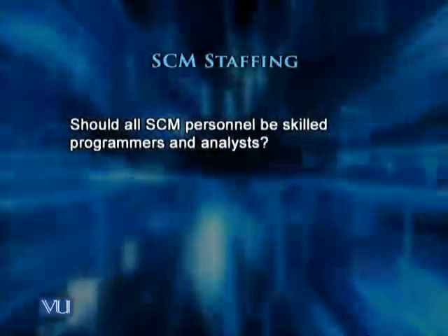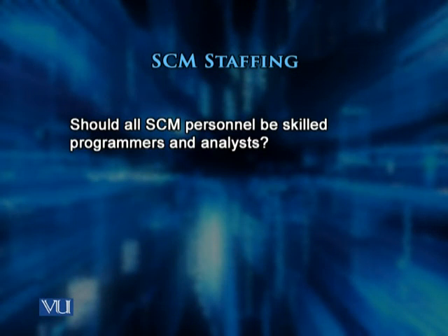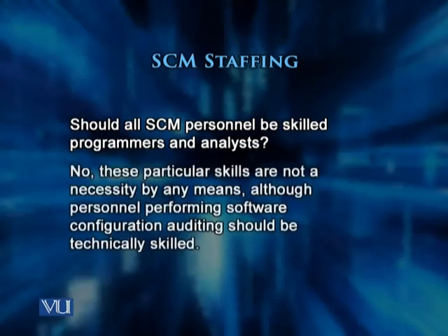Now the question is, should all SCM personnel be skilled programmers and analysts? And the answer to that question is no. These particular skills are not a necessity by any means, although personnel performing software configuration auditing should be technically skilled, because they have to look at the different work products.